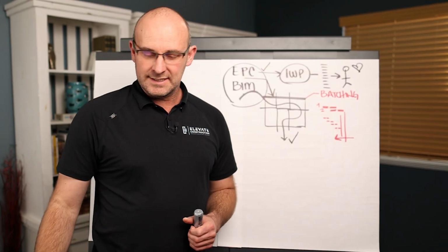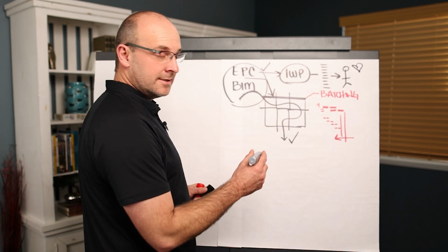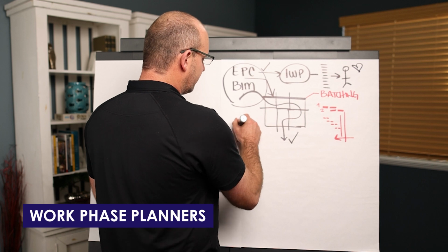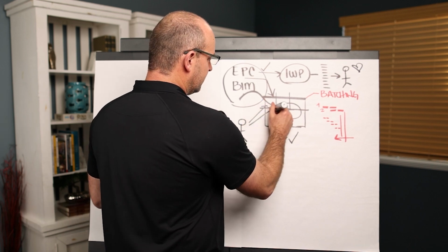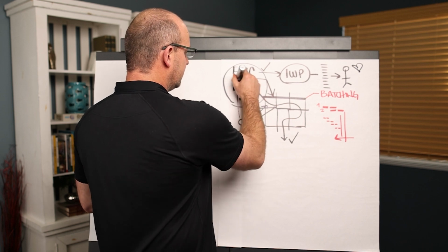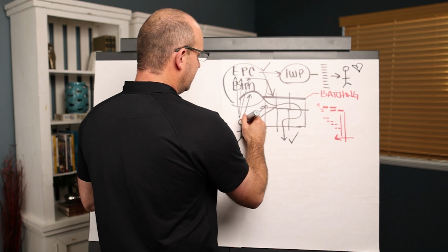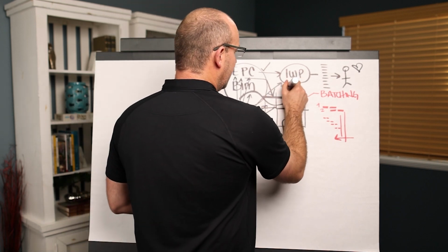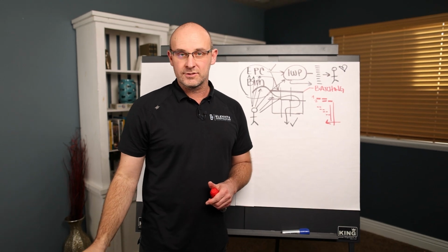But the problem that I see here is that in the advanced work packaging system, what they say is that you have what's called WorkFace Planners that will consider the area, consider the path of construction, take a look at the model and understand the engineering, procurement, and construction requirements, and they will create your installation work package and hand it to the foreman. Now, that's great in theory. There are some problems with this.